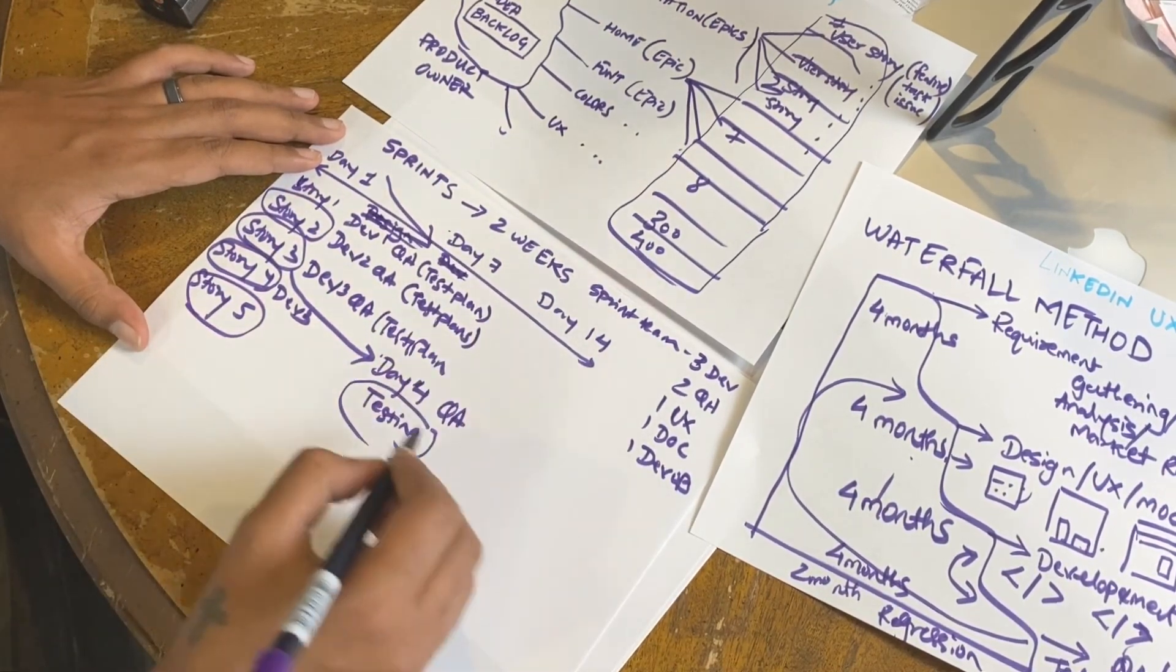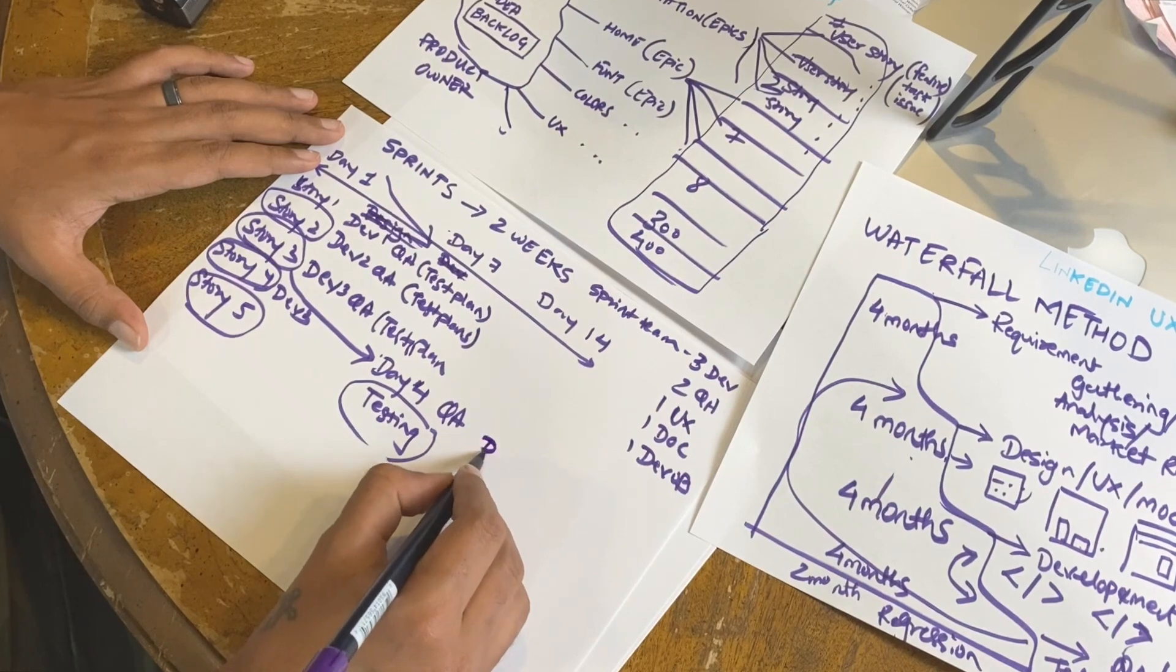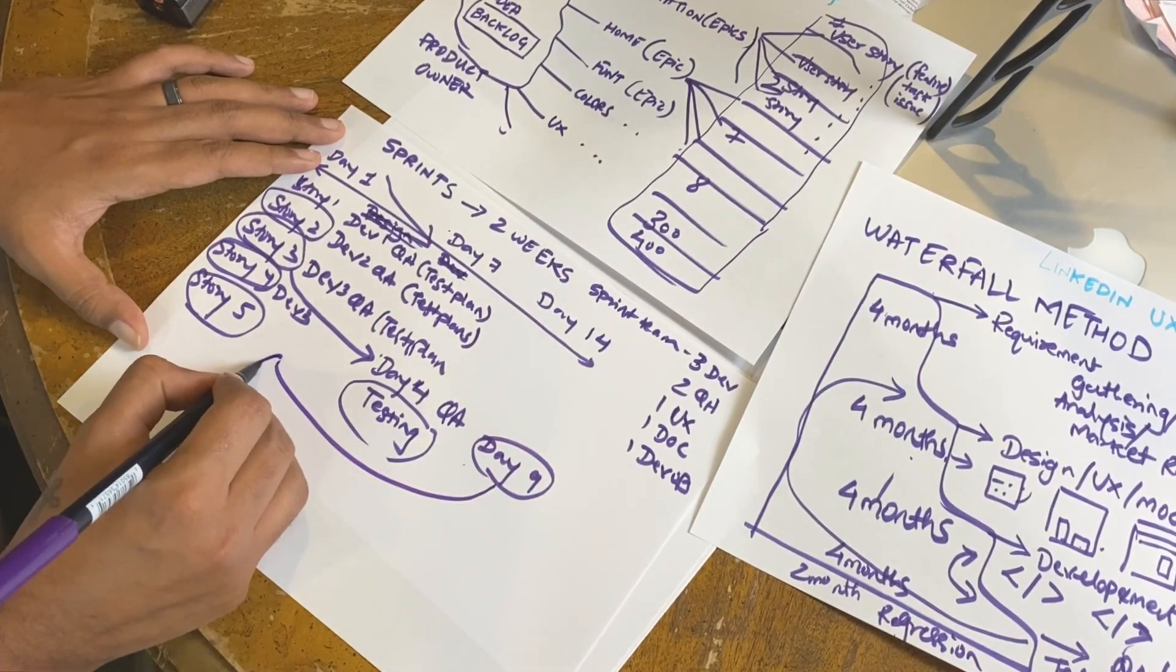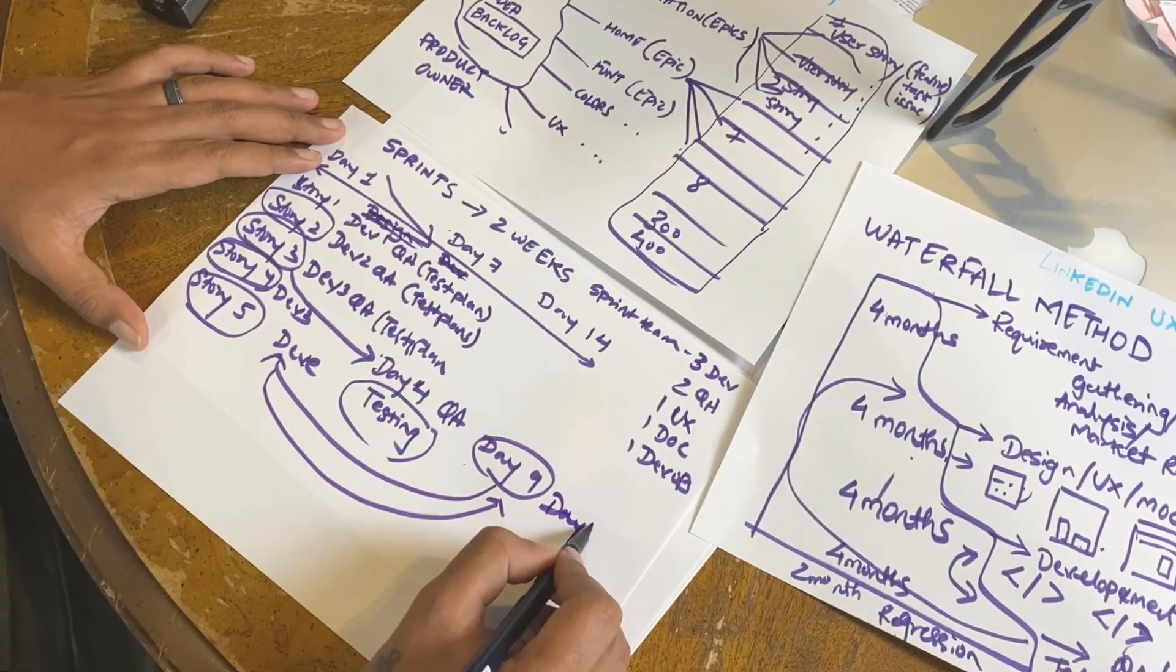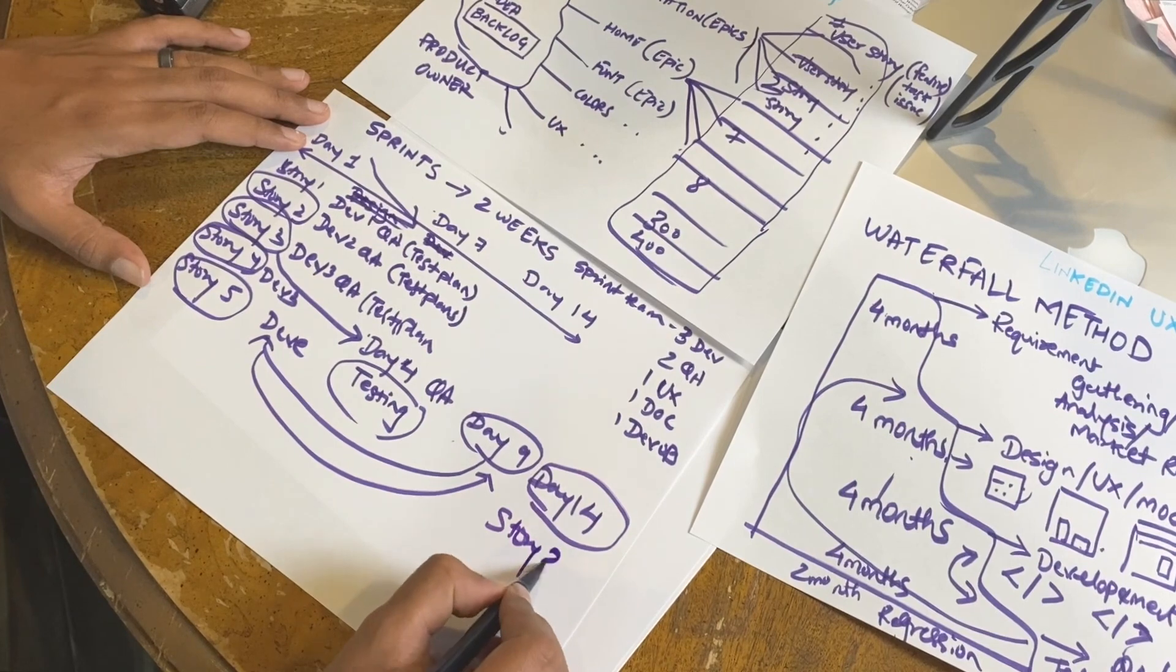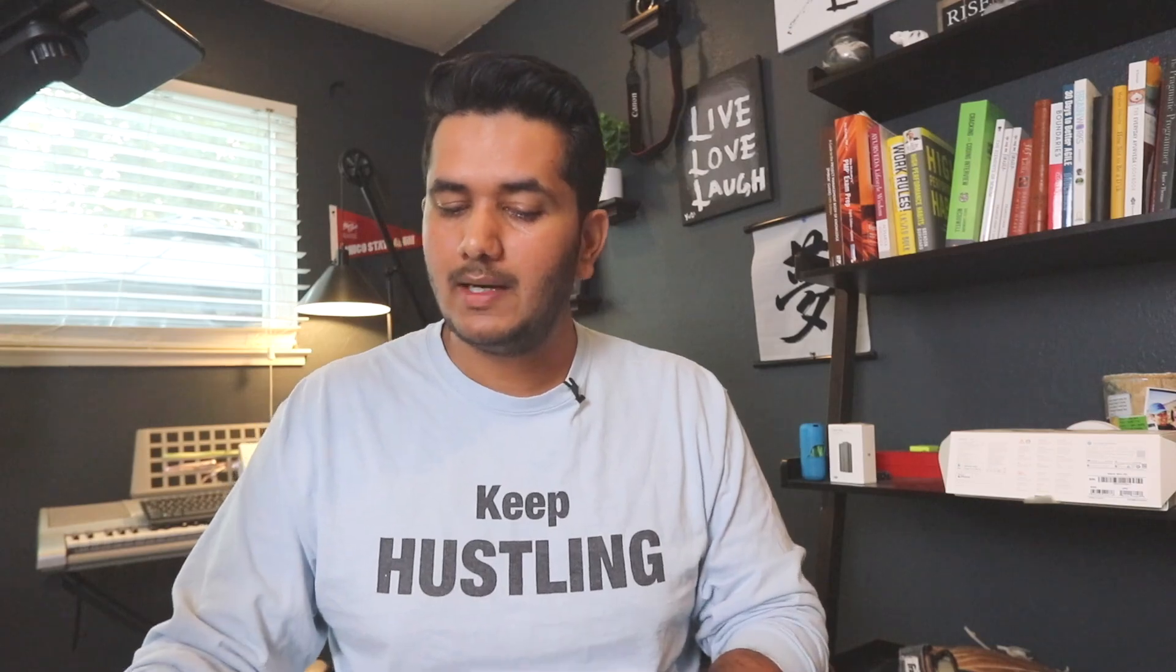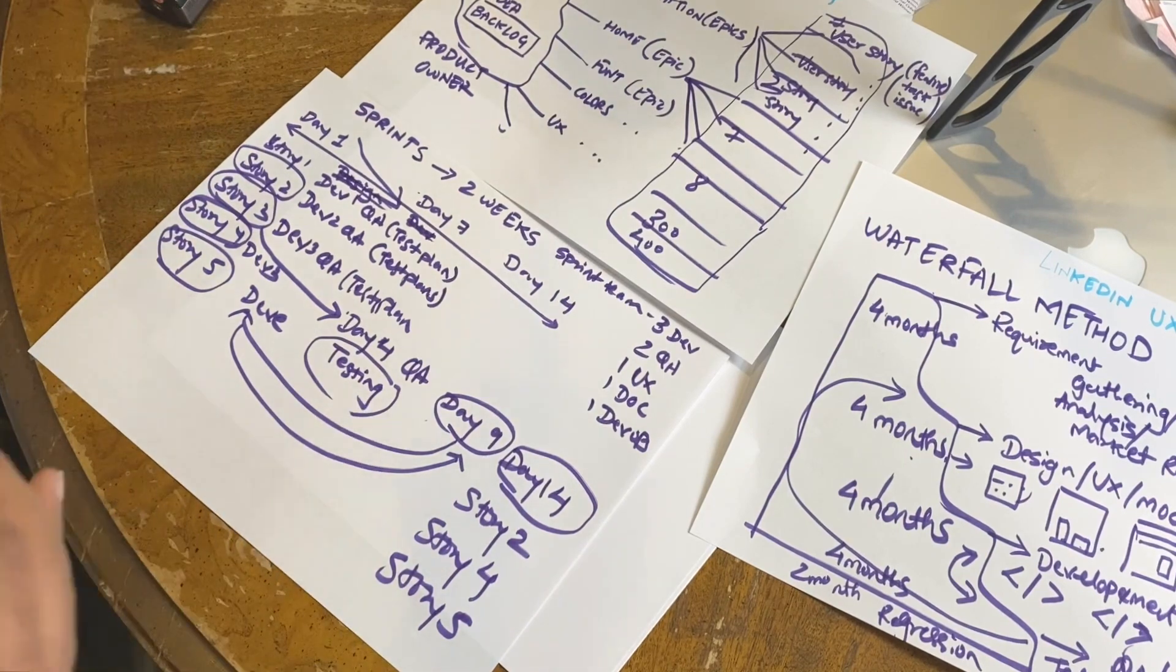Let's say on day nine, they found something on this story. It goes back to developer, developer fixes it and it goes back. By day 14 they have to finish everything they've got. It is possible on day 14 they can only get story two, story four and story five because on the first sprint you don't know how much is the velocity of the team. Velocity is another term which I'll explain sometime later, but basically you don't know how much work can get done on the first sprint because you're getting started. Your estimation gets better when you start working on more and more timelines.